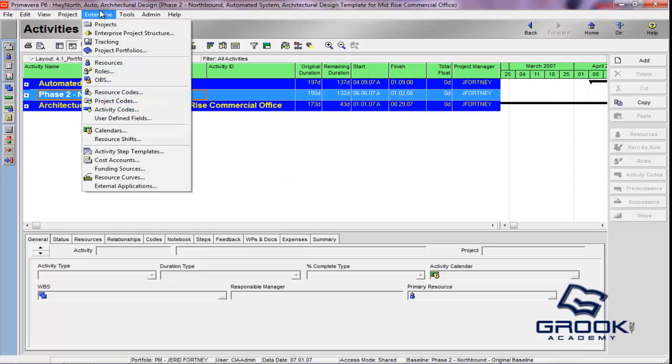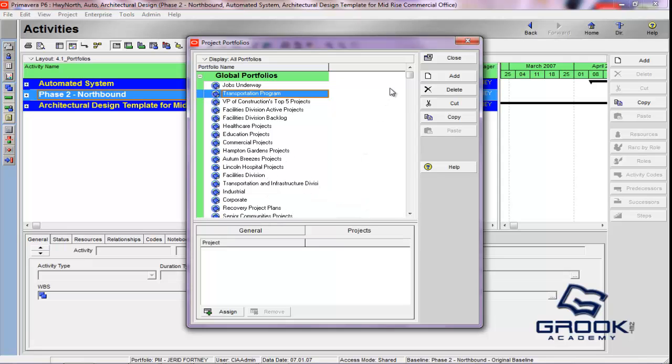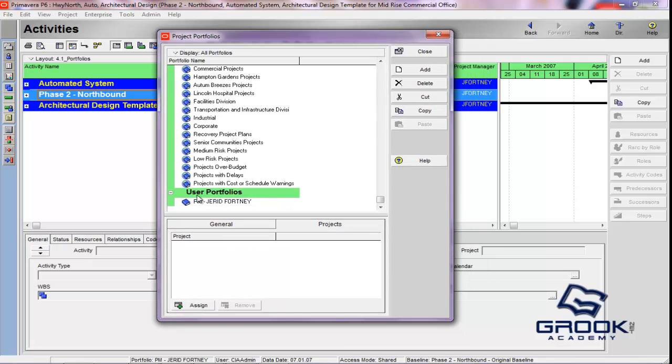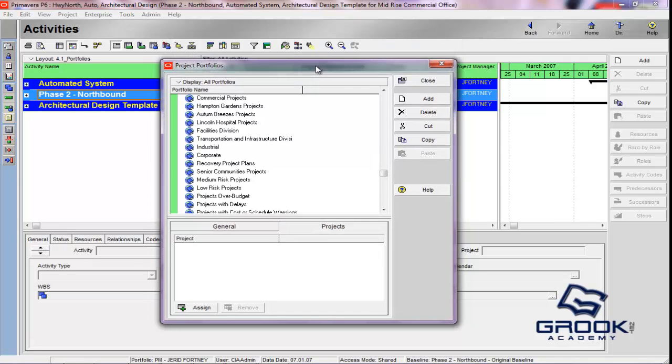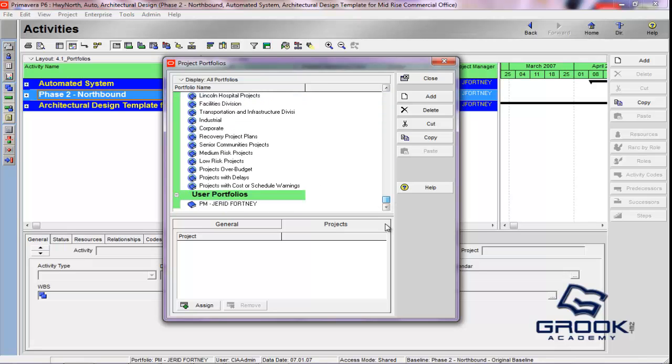Now, in my experience, I've used this in many ways, but I found that if you're going to have a very large project, let's say 30,000-40,000 activities, hundreds of millions of dollars, the way that I utilize this is to break the project down into smaller projects, and you can assign those projects to different project managers, or you can assign them to specific subcontractors, and they may be coming in via Citrix or remote desktop or whatever scenario you have set up.